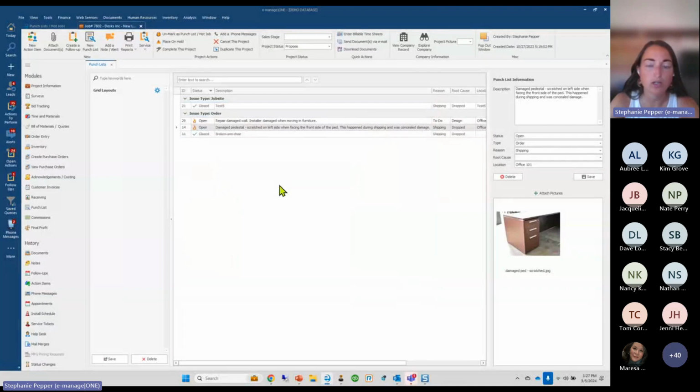Right. So as we start to manage these punch lists, we'll talk about managing them in the mobile app as well, but specifically just talking to the desktop application, what you'll do is mark these as closed. Next question. When closing out AIs, that doesn't close the punch list items, correct? Absolutely not. Correct, Amanda. It does not close the punch list. So you will need to come in here and actually physically close them in the desktop application. You'll see in the mobile app, the interface looks slightly different, but the functionality is the same.